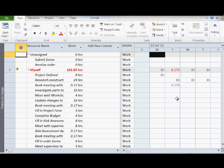To be clearer, over-allocation is like showing where overtime will occur. If someone has an 8 hour day and they have been assigned tasks of over 8 hours, this is an over-allocation. If you have assigned an overtime rate in the resource sheet, hours over 8 hours would then be paid as overtime. Removing any over-allocation will then save your budget money.